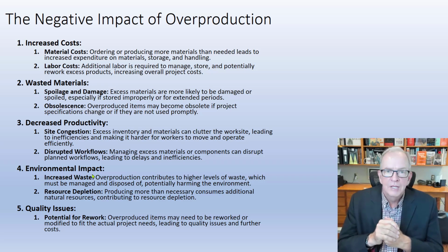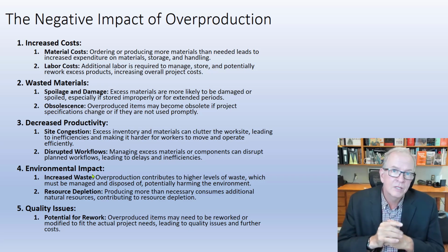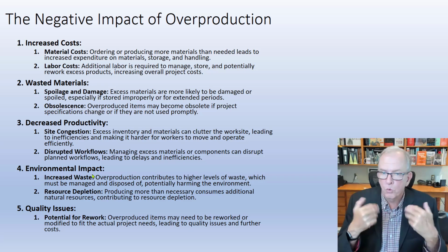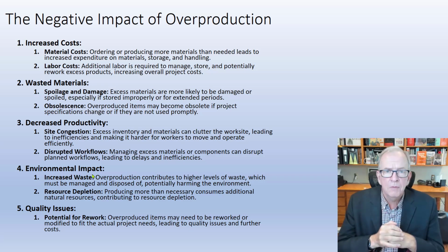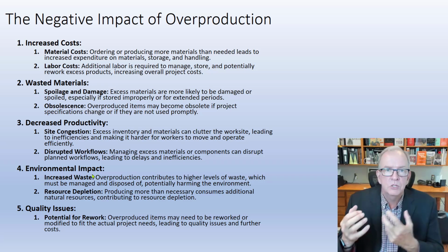There are different studies done on construction projects, and it often is between 10 and 30% the amount of extra material that we use or we have to repurpose in different ways on a construction project, and the waste that's involved with that. So definitely can have that impact on it. Just think about the amount of energy that goes into producing Portland cement. And basically that's not exactly helping us from a climate change point of view.